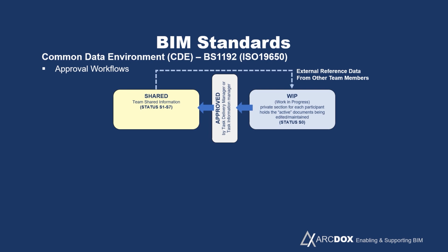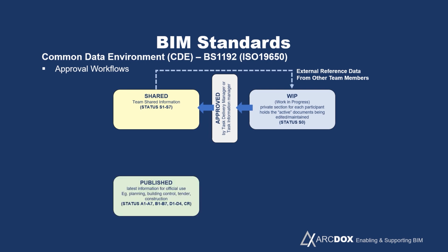If you're referencing files within your own environment, xrefing files, then obviously you take those from the shared state of another organization and use those as a reference in developing your design information. Finally, at the end of each work stage within the process, you want to get final sign-off from the client and acceptance from the employer.